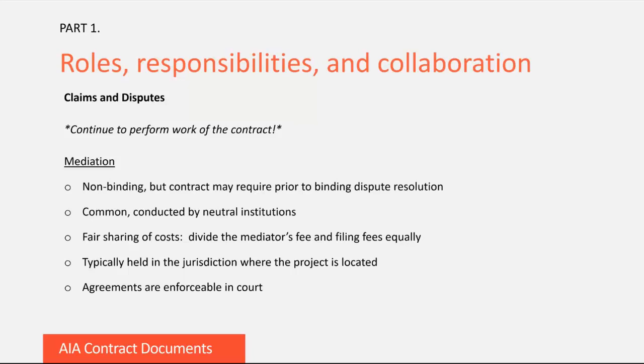And as a point of clarification, there is no appeal of a mediation outcome because it's a negotiated agreement between the parties and not a ruling made by an independent fact finder. The mediators are there to guide the parties' discussions and lead them to an eventual agreement.